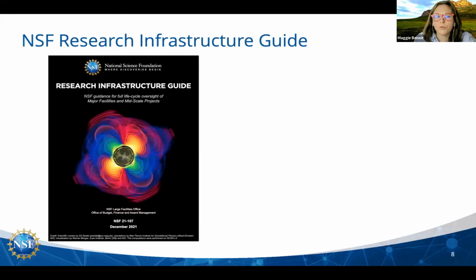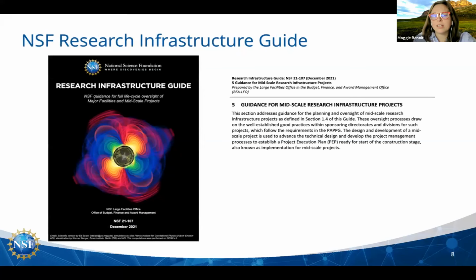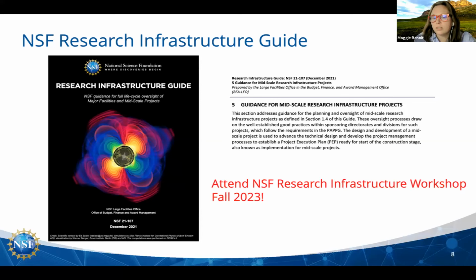And so a couple of additional pieces of information for developing these proposals. If you're considering these programs, we strongly recommend that you look up the NSF Research Infrastructure Guide, or RIG. There is a chapter that's fully devoted to providing guidance to the community on developing mid-scale projects. And there's lots of information on developing that project execution plan. So there's a template available and additional information about the level of detail that's required for the different programs.